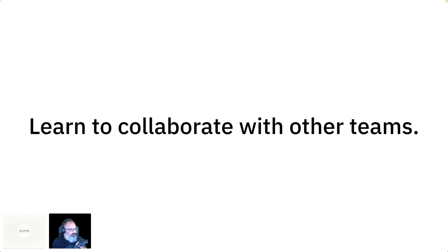It's now shared knowledge. And then the ability for a brand new human to come into the team and be functional very quickly becomes almost, not instantaneous, obviously, but so much faster than the 6, 8 months you had to wait to ramp them up. You spend that time up front to be able to create this system. And if you have to train someone new every single week or every 2 weeks, believe it, the ability to get them to be functional just changes. And it'll add new blood and new ways of doing things to come into those teams where successes are happening. That subsidiary saw their velocity just skyrocket. It slowed down, but then it just picked up and went.